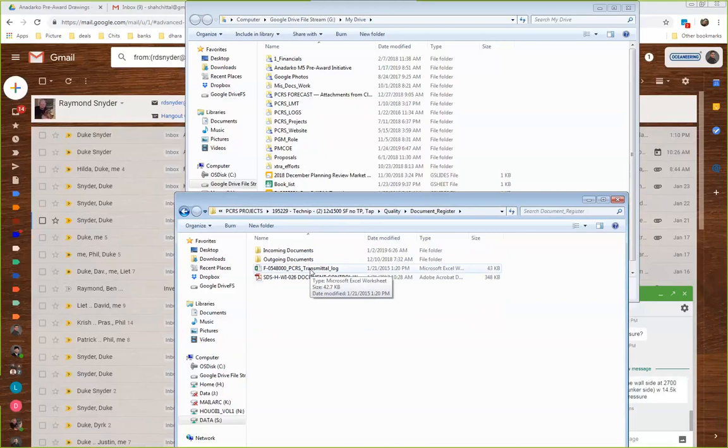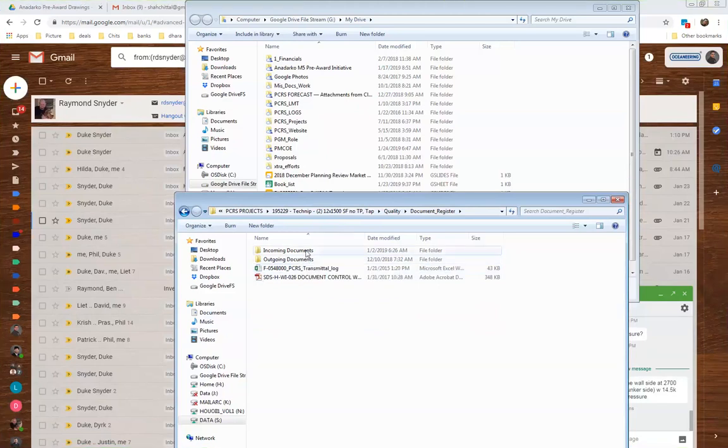So you just click the document to her, and during the kickoff, you have talked already on what the document transfer requirements are. So if she has to send to a specific email, specific group, format it a certain way, all that is discussed already. She keeps it, and then you just click the document to her with the project number. She'll plop it in the incoming document, add it to the register, and manage it from there.